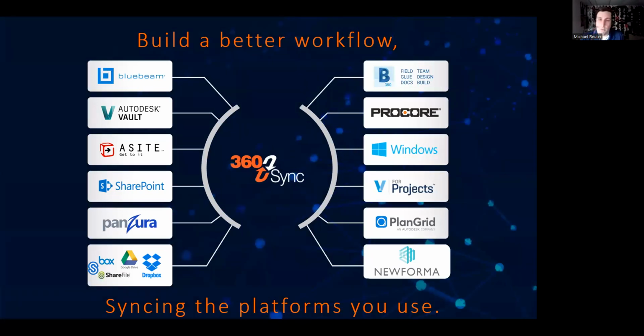Maybe they add a couple of drawings or markups, but they save that. Then once they're done with it, they hit the export button and export that as a PDF, or if there are attachments, like a markup or a drawing, they zip it up. And then they have to send that to the architect.